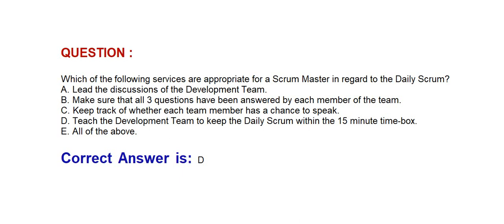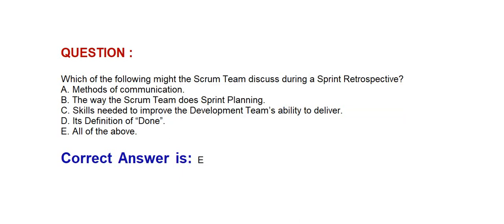Teach the development team to keep the daily scrum within the 15-minute time box. Next question: Which of the following might the scrum team discuss during a sprint retrospective? Option A: Methods of communication. Option B: The way the scrum team does sprint planning. Option C: Skills needed to improve the development team's ability to deliver. Option D: Its definition of done. Option E: All of the above. Correct answer is Option E: All of the above.